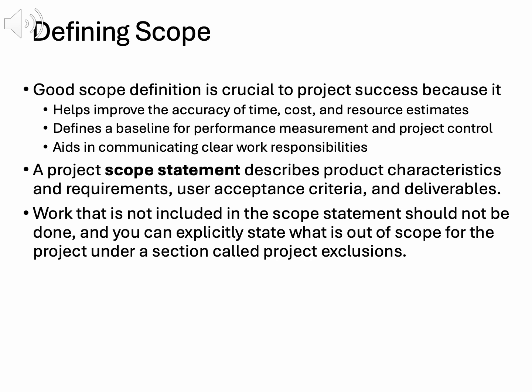Creating a scope statement involves collaboration with stakeholders to define needs and validate deliverables. It's a living document, updated as new information emerges, labeled as version 1.0, 2.0, etc. Regular updates prevent scope creep, ensuring the project remains focused. In the training project, stakeholder input ensures courses meet employee needs without unplanned additions.